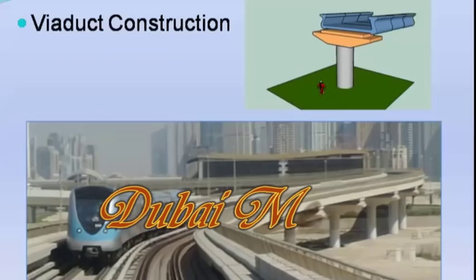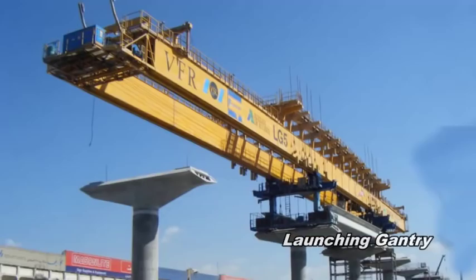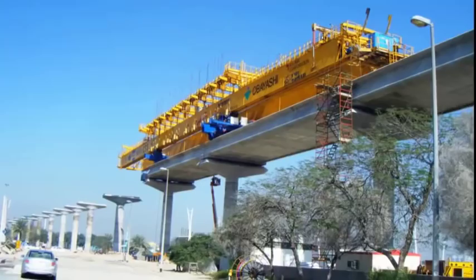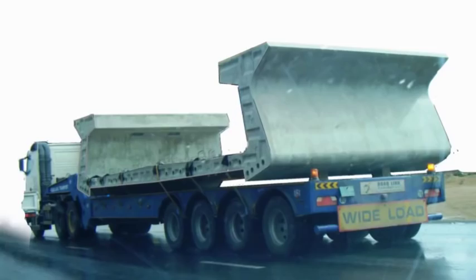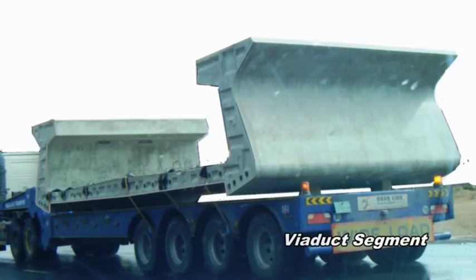The viaducts were constructed using the span-by-span method with U-shape precast concrete segments, erected using a self-launching gantry. Average span was 45 meters; segments were 10 meters wide by 4 meters long and weigh 55 tons. The placed segments were post-tensioned and the cable ducts were grouted.